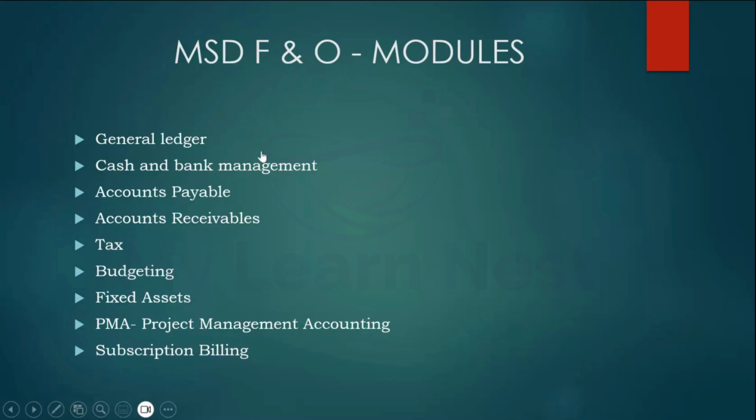And project management accounting is used to record the transactions project wise. If you take an example of any real estate company, they might be having multiple construction projects, right? So they need to allocate the resources and expenses project wise. They cannot club everything. If there are 2 or 3 buildings, the expenses and income related to a specific building, they have to consider as a project. So if the business is project based, then they use this project management accounting to bill the resources.